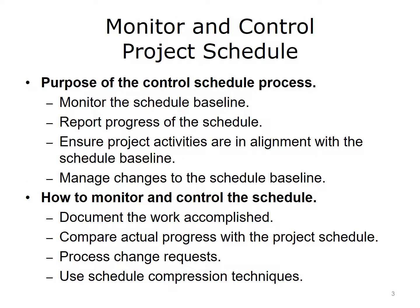One resource that you'll refer to again and again will be your project schedule. The control schedule process monitors the status of the project by determining if the project work has been accomplished and delivered as planned. The project manager measures, compares and analyzes the actual performance reported by team members against the schedule baseline.